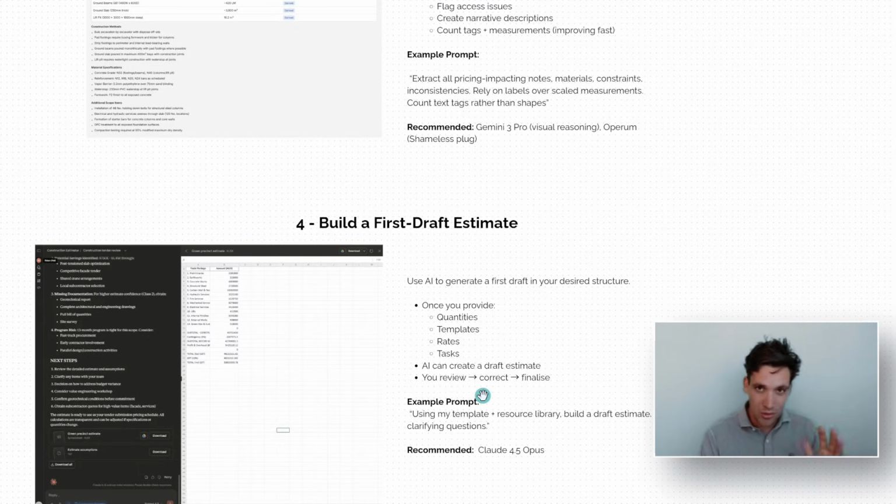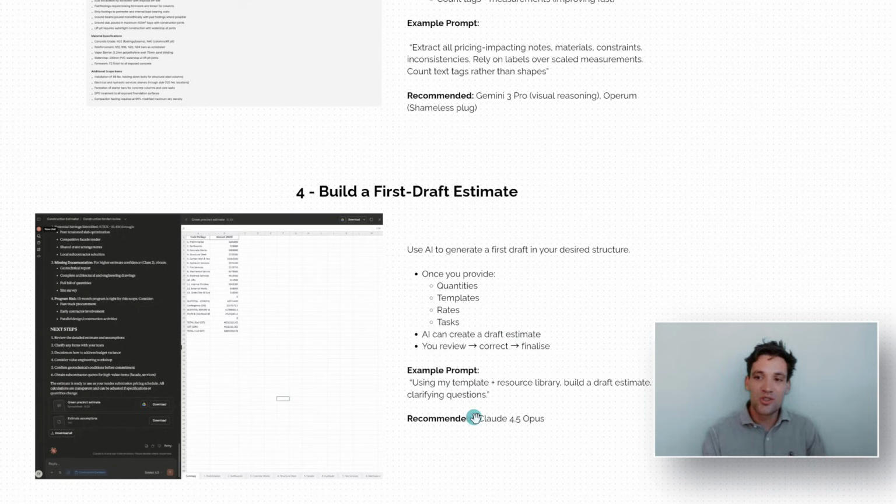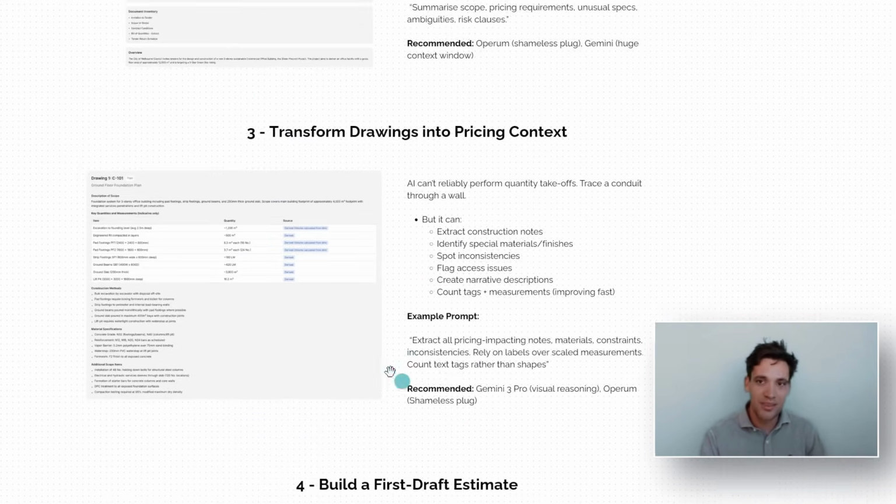So for example, you break your commercial construction project down into earthworks, concrete, structural steel, fit out, services, whatever. Once you've got that breakdown, you've measured any key quantities, then using a well-crafted prompt and giving as context that breakdown of the project with the quantities, the tender specifications and package, and your own activity template library.